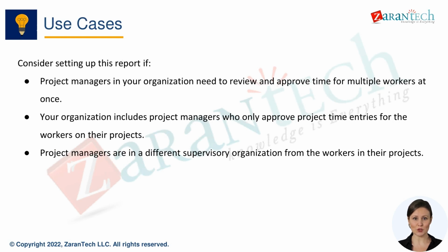Consider setting up the Review Project Time Report if project managers need to approve time for multiple workers. Project managers only approve project time for workers on their projects. Project managers are in different supervisory groups than the workers.